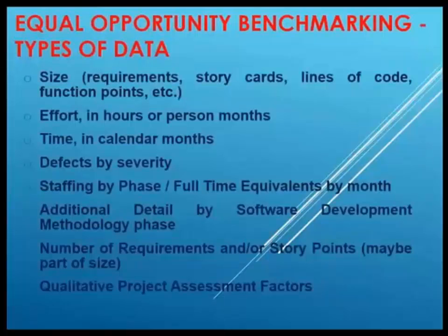Getting even further into that detail is some of these types of metrics that we want to get. Size, and I'll be drilling down even further into size in just a moment, but that can be in terms of requirements, stories, what we call story cards, lines of code, function points, and I'll get into some of those common denominators of how to store this information. Effort in terms of hours, work, person, months.